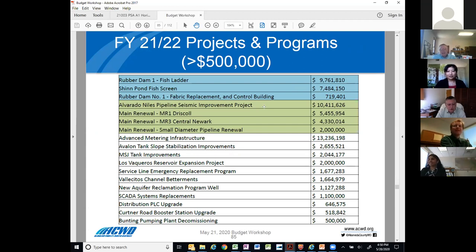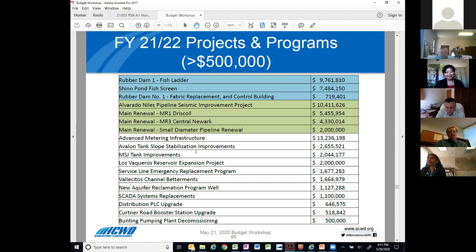The second comment is to try to look at multi-year estimates because these projects have a tendency to roll over into the following year, and coming up with a multi-year estimate as opposed to a single-annual estimate may give a better picture of our real experience. Those are rhetorical comments. Thank you, Director Weed. Director Sethi — Rekha, could you describe what the service line emergency replacement program is? It's an emergency program. We often have failures related to our service laterals and currently don't have a specific program for service line replacement, so we have allocated budget to take care of emergency replacements every time there is a break or leak in a service lateral. This would also be part of our main renewal program for planned projects.